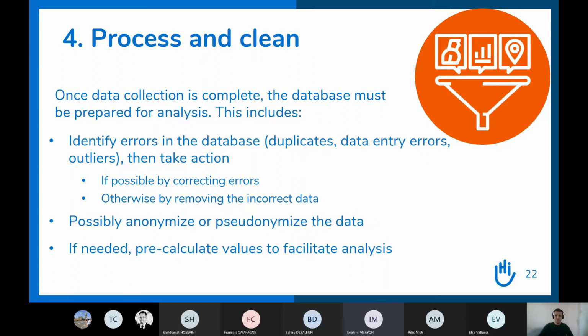At the end of the data collection, when the data collectors left, because they were casual workers we just hired for a period, they left, and we did the data entry. During the analysis, we encountered a lot of challenges during the cleaning phase, because we failed to do some quality checks at the time of the data collection.